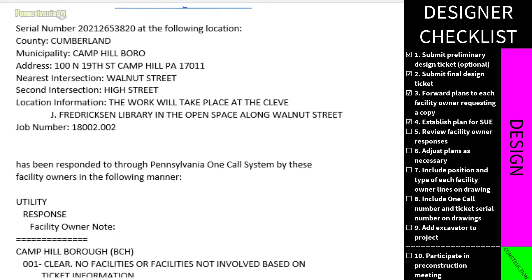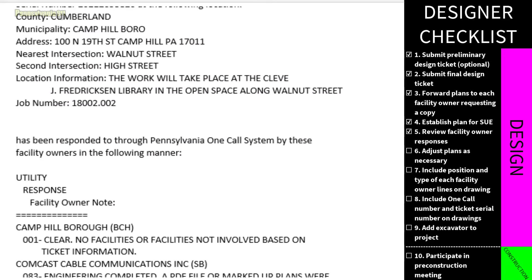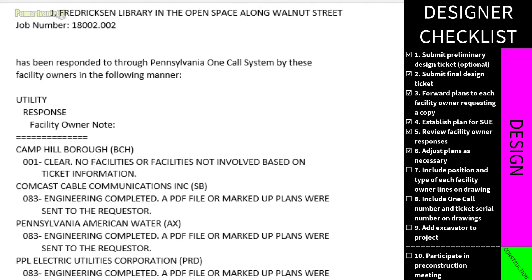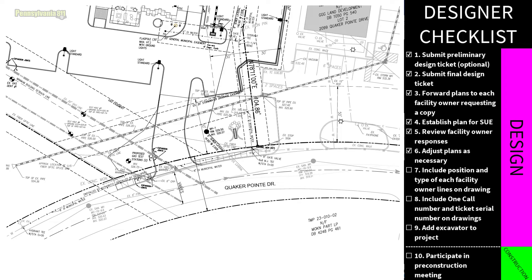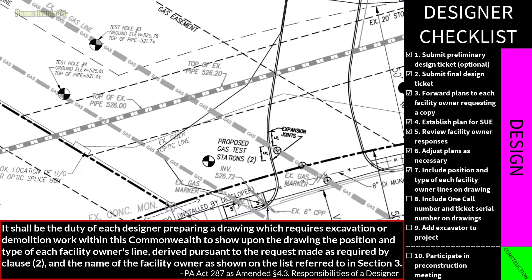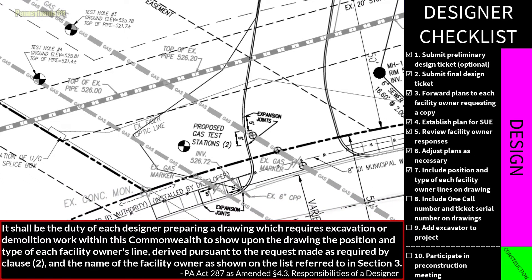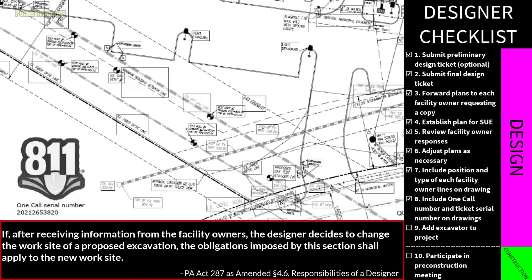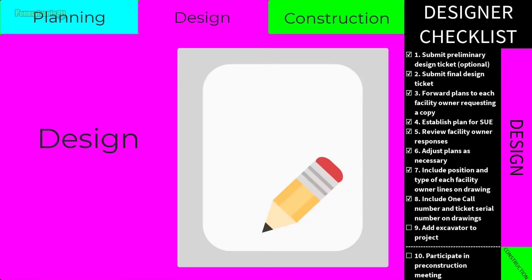The next step is to review responses from facility owners and make adjustments to the design to avoid unnecessary conflict. While creating the design, the designer is responsible to: show on the drawing the position and type of each facility owner's lines and the name of the facility owner; show the one call serial number and one call phone number on the drawing; and create a new design request if the scope or project site changes. That concludes the design phase.